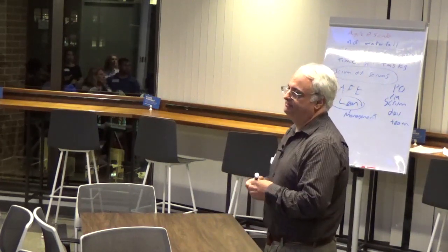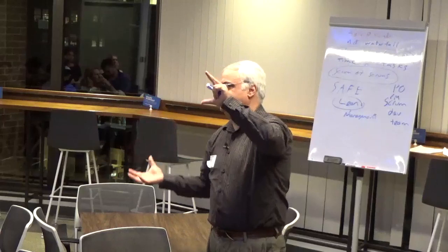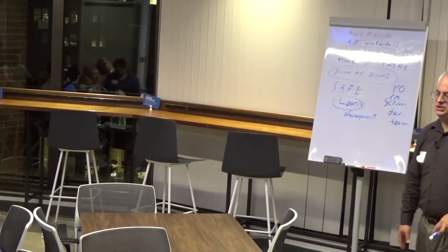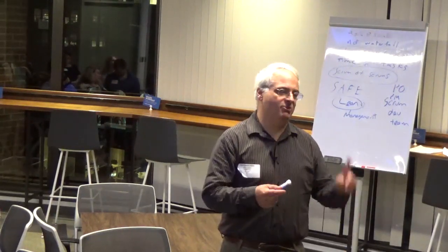If you want to think of it in terms of Scrum, the product manager is sort of at the epic level, and the product owner is at the task level, and they collaborate. They actually work together with meetings and things like that to make sure everything's in sync. How are decisions made between different product managers in Scrum is the question. It's a great question. In my case, there was one product manager who was working on 2 Scrum teams.